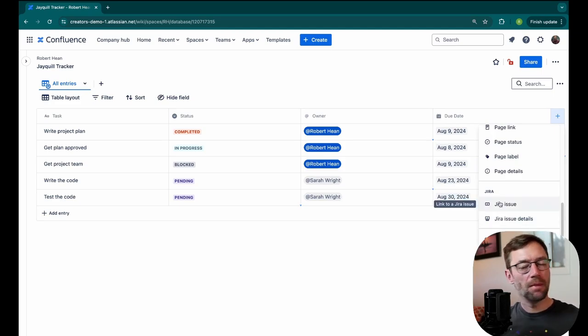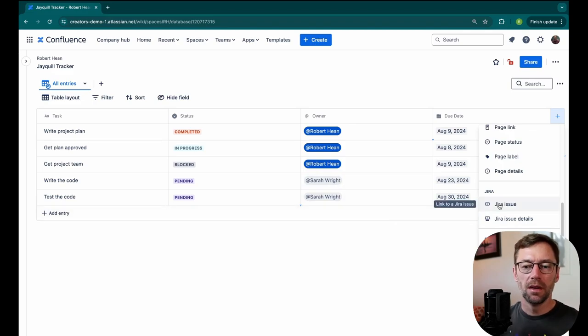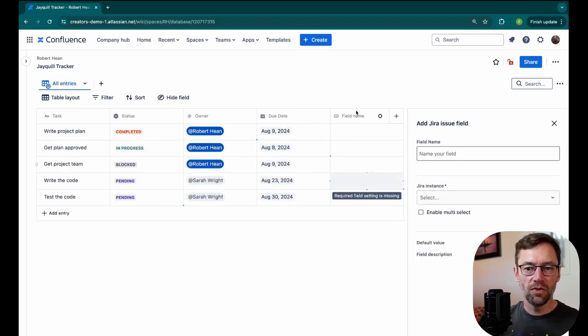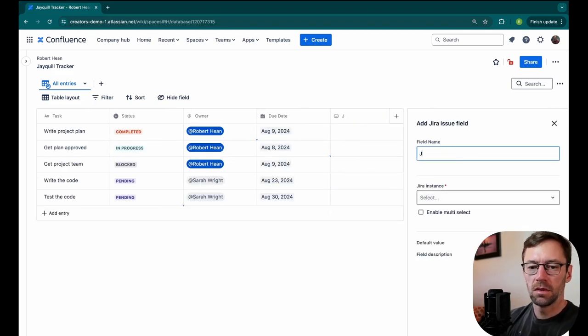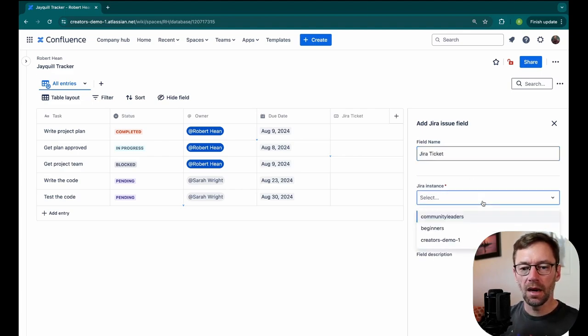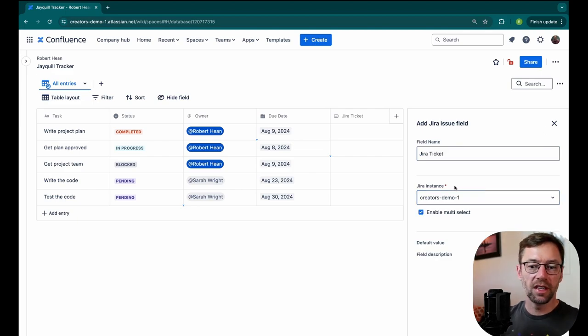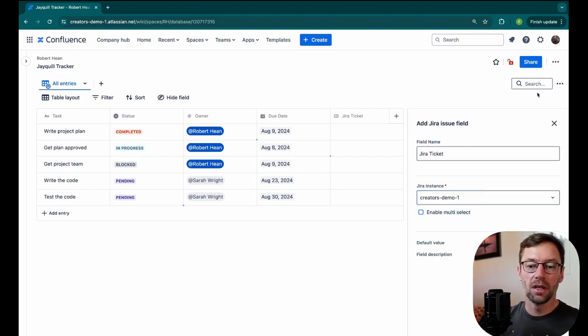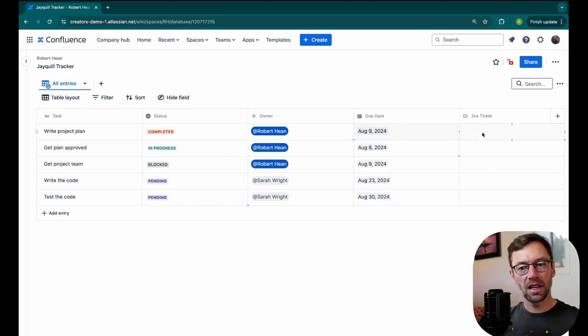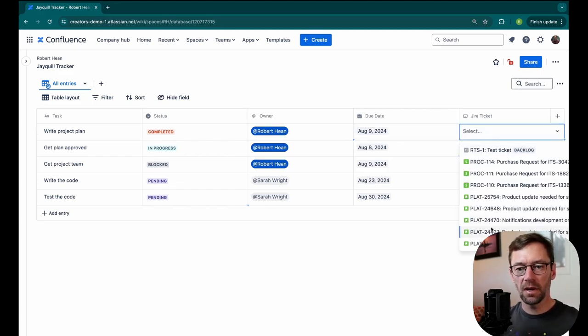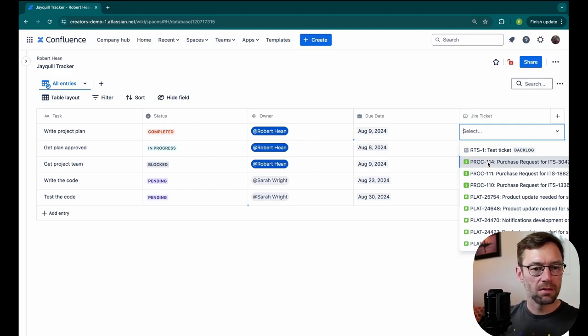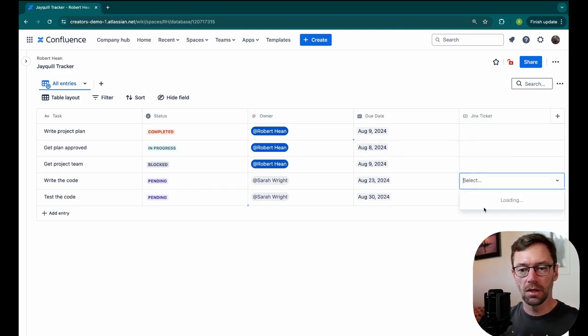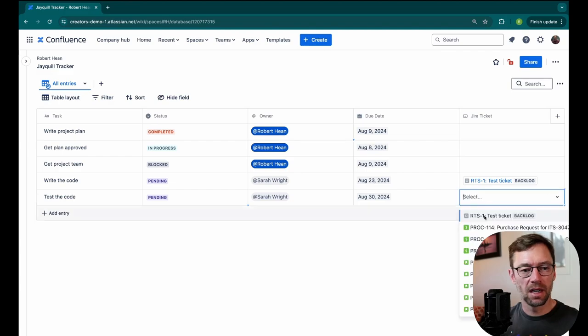I'm going to scroll down to the bottom and look for this JIRA connection. I mentioned that I might be using JIRA to manage this project. Maybe not every line in here has one. But if I add a JIRA issue field, I might call this JIRA ticket. I then select an instance I have access to. I can link one or more JIRA tickets. Selecting multi-select lets me add multiples. Then just clicking in that field will bring up every JIRA ticket in that instance. So I'm just going to quickly say some of these are connected to JIRA tickets.